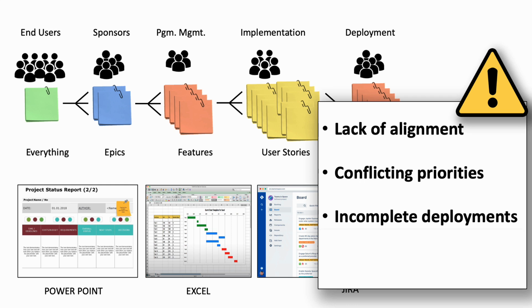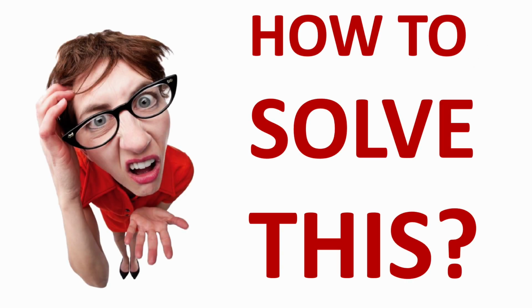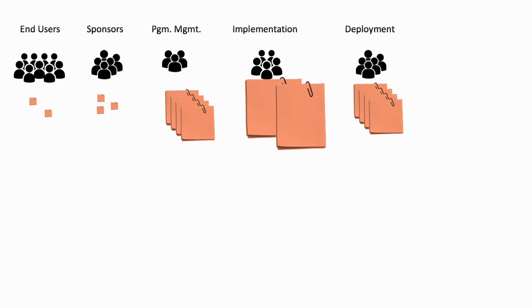And regarding the reporting and the way that progress was being visualized, there were often inconsistent data between Jira, Excel, and PowerPoint, being that also a little bit confusing and undermining the credibility of the whole solution. So, after some discussions, the solution that we came out with was basically to have a single unit to measure progress, and the one that was chosen was the feature, because this is the minimum that is being deployed into production.